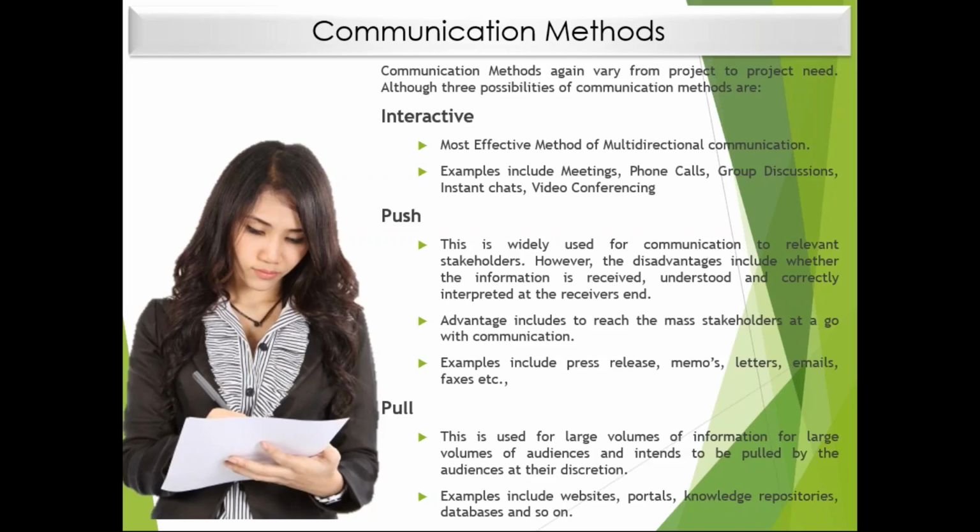That's an example of pull. Often in our projects, we use a combination of all these three. We interact with high power stakeholders, who are most likely inventors and investors. We push the information to certain low power stakeholders, often impacted, and they pull whenever they need it. All three categories generally pull the information depending upon the requirement of any particular document or record.